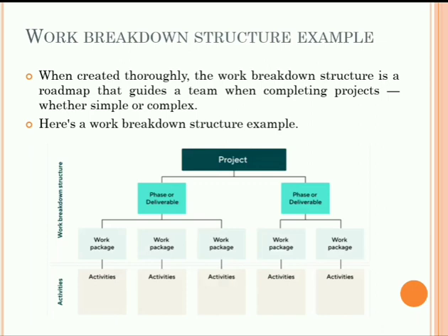You have to go just deep enough for the purpose of creating that work breakdown structure, because you can get crazy with subtasks on your work breakdown structure. The work breakdown structure has to be detailed but not so deep that it becomes confusing for the people. Ideally, it should be three to five levels at most.